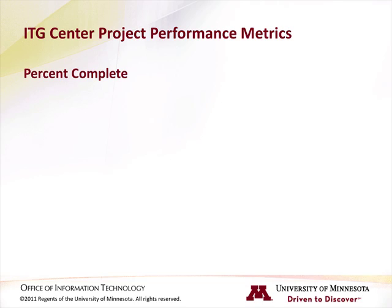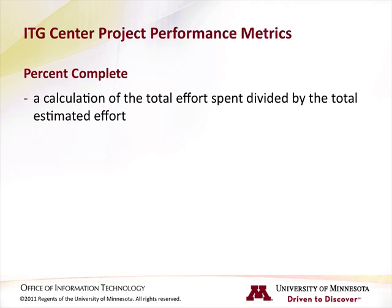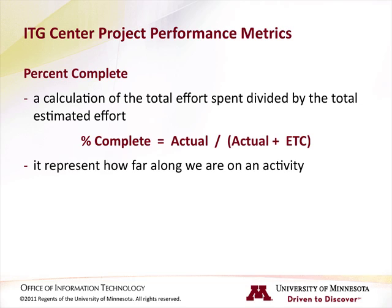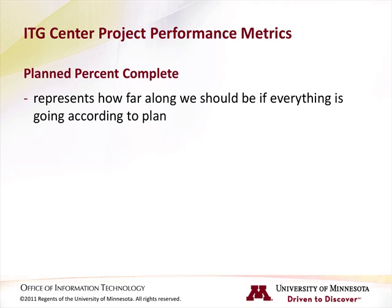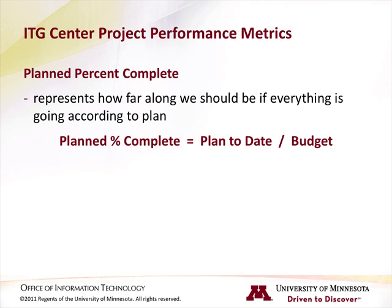Percent complete is a calculation of the total effort spent divided by the total estimated effort. The calculation is actuals divided by actuals plus estimated time to complete. Percent complete represents how far along we are on an activity. Plan percent complete represents how far along we should be on a given activity if everything is going according to plan. The calculation is: plan percent complete equals plan to date divided by budget.